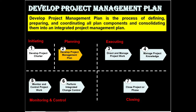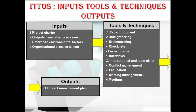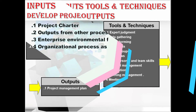Hope you understood its definition and the key benefit of this process. Let's quickly go through its ITTOs in detail. In inputs we have the project charter, outputs from the other processes, enterprise environmental factors, and organizational process assets. In tools and techniques we have expert judgment, data gathering techniques — brainstorming, checklist, focus groups, and interviews — interpersonal and team skills, and meetings. In outputs we have only one output: the project management plan. Let's discuss its ITTOs in more detail, starting with inputs.